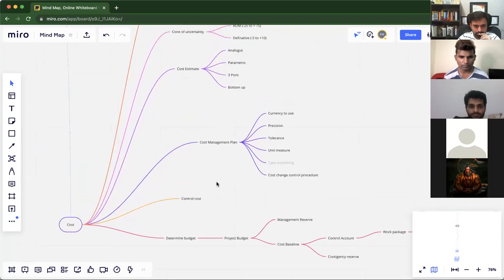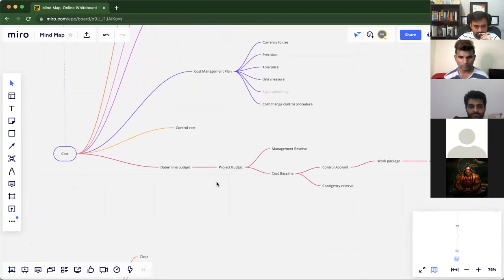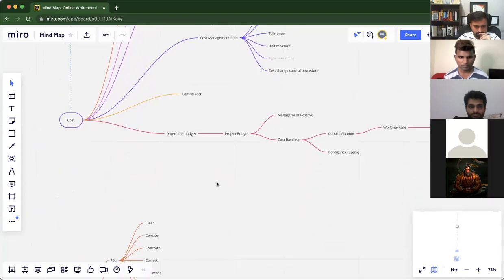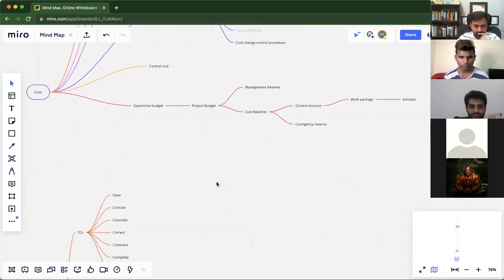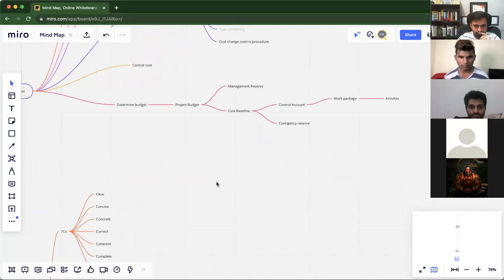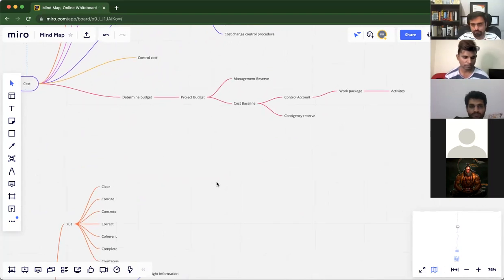Then you come up with a cost management plan, which captures all these things which have been listed. The next thing naturally is to be able to control your cost. Once you've got that, based on your cost assessment, we build up a budget. On the budget, we've got certain degrees of contingency funds. For items that we have forecasted as likely risks, we tap into contingency reserve. If something just comes up and hits us out of the blue, then we dive into our management reserve.